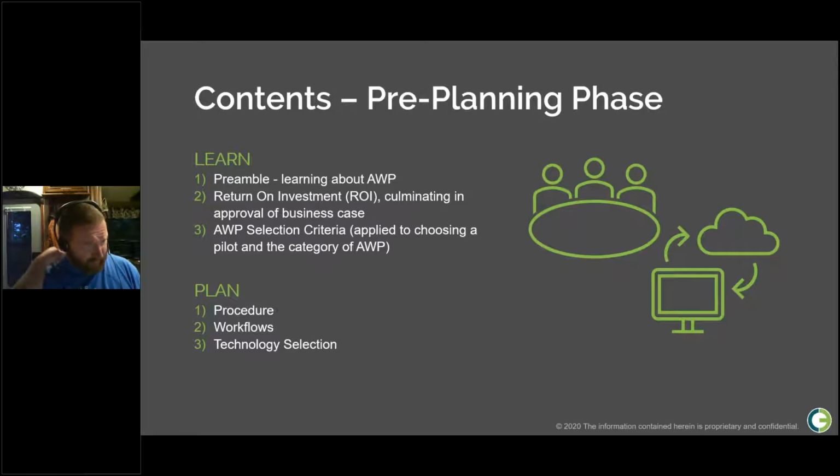One of the big things I've learned about AWP is that you're going to do all these steps, all these processes, anyway. Like, we talk about path of construction with AWP, planning out the sequence of installation. You're going to do that on a project, whether you're doing AWP or not. It's just a question of timing. Are you going to do that the week before you start construction and suddenly realize you don't have a bunch of the material that you need? Or are you going to do that back in the early stages? So a lot of these things aren't additional effort. They're not additional work. If you're executing a project, you need to be doing a lot of this stuff anyway. A lot of it's about putting it in the right sequence and at the right time to make sure that it's going to help structure and plan the project well.